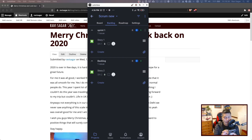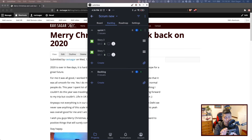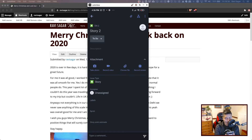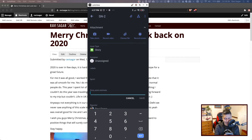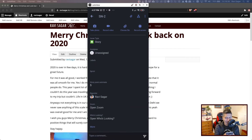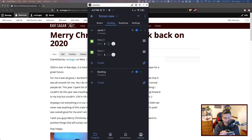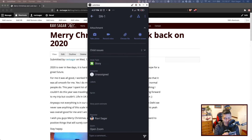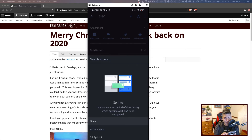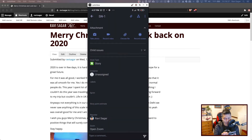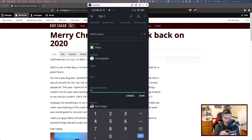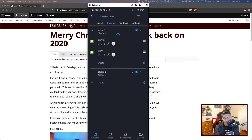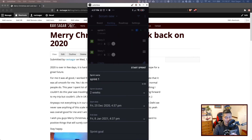Move to sprint. I also want to estimate because we are doing story points following agile — five for the next one, maybe six for another (it's a big activity). So now we have the sprint and the total story points is 11. We can start the sprint, set the duration, set the sprint goal, sprint start date, and so on.